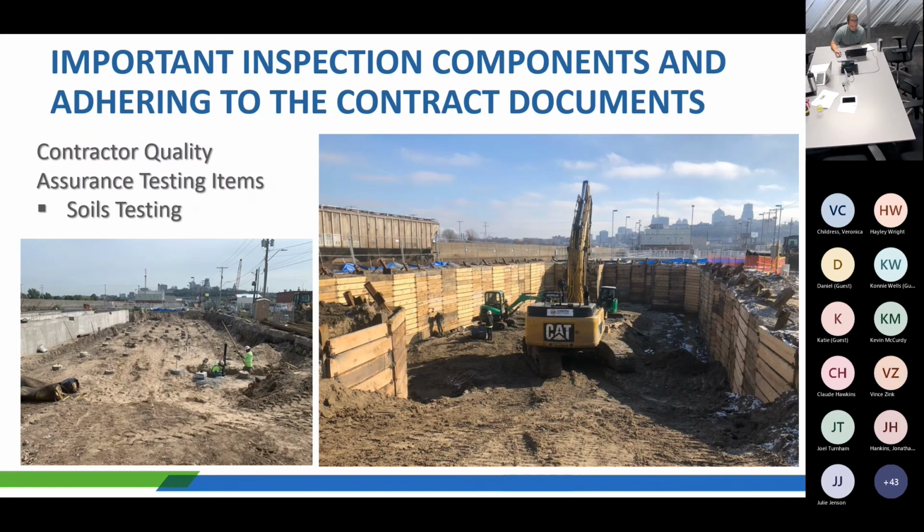A lot of times, though, it's the RPR that's going to be responsible for helping to coordinate the efforts to get this work done. So having that RPR present and working with the contractor to plan out the work and understand how things are going to come together is pretty important, because they're going to be the ones responsible for setting up some of the third-party testing that's required. Some of the testings that we're going to cover here are things that the RPR can observe by themselves.